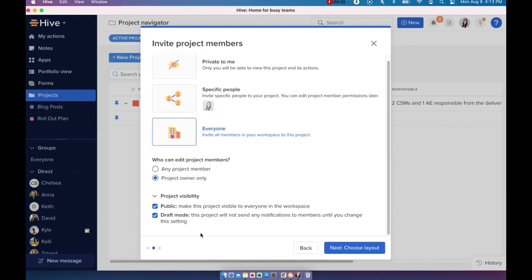So this is great if you're working with deadlines and if you keep changing the due date and assignees of certain action cards, then you might want to consider putting your project in the draft mode.